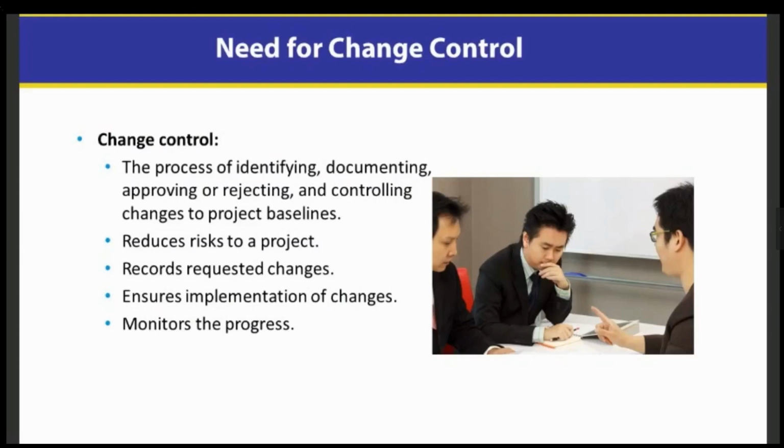So we need to control those changes going forward as well. So once we implement them, then we need to calculate our project baseline so that we have a new baseline to go by. Because if you're adding scope, that's going to change the other two legs of the triangle. Probably adding cost, probably adding time. You got it. And so we need to make sure that everybody understands that and accepts that going forward. I can't have people add a year's worth of work and expect us to stay to the same timeline. It's not realistic.